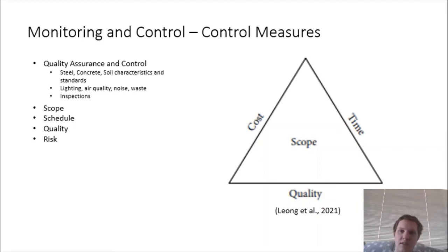Changes to our baseline scope are considered to be almost inevitable. The frequency and magnitude of these changes will be mitigated by the development of a detailed scope statement with continual feedback from the client in order to set a scope baseline and prevent unnecessary work. Like schedule and cost controls, the baselines will be consistently monitored utilizing the digital programs to adjust work breakdown structures and baselines, opting for a more flexible response to change.